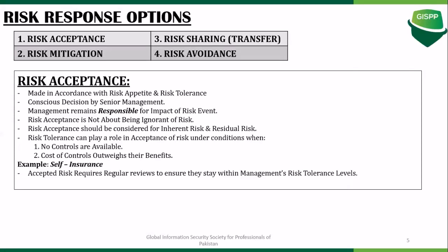The level of risk and its potential impact can change dramatically, because the assets can increase or decrease in value, new threats can emerge, sometimes attackers gain additional skills or motivation, and sometimes new vulnerabilities are discovered, and the existing controls tend to become weaker, and sometimes the operation teams start becoming less diligent in their work. So these are all the factors that mandate reviewing the entire risk acceptance procedure again.